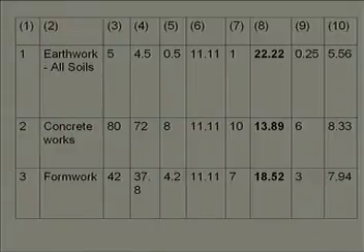So this is a situation of back end loading. You will see that when you go further down these slides, in column 10 for later items the margin would be changing. For later items you will find that we will be using higher margin when compared to uniform loading.